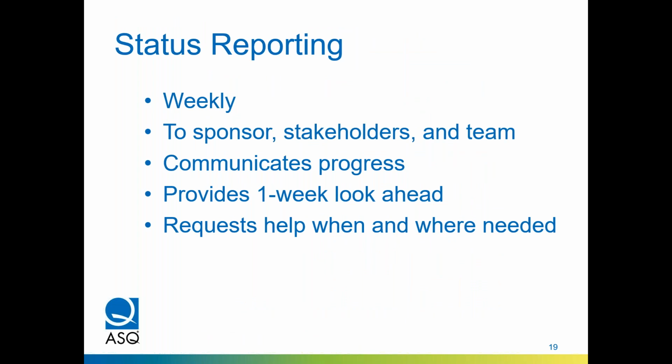Status reporting. Again, it depends upon the cadence, but for me, a lot of these projects have a weekly cadence to them. So a weekly report to the sponsor, stakeholders and team, documenting what was done, indicating what the next week of work is going to look like, or if the cadence is different than a week, it would be the next whatever time period it is. And then where help is needed and when.